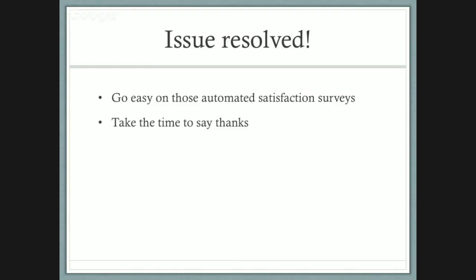Are you charging per issue? Like opening a new issue costs them more money? No, it depends on the kind of agreement we have with people. It's all different. But for an issue that somebody reports that comes out of hours they've prepaid, a retainer, it's eating their retainer hours for us to fix that. So it's not issue by issue. There are some places that do charge issue by issue, and in that case I can understand why people would keep asking you to do more within the same issue.